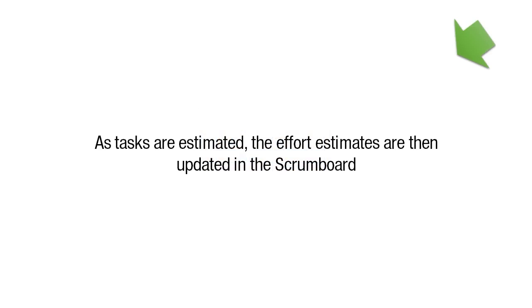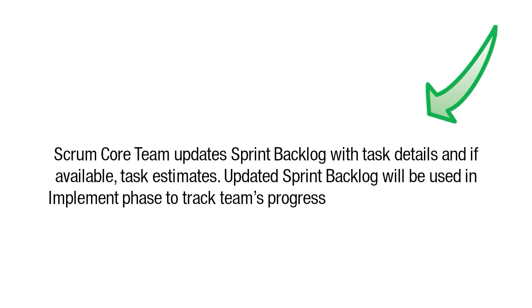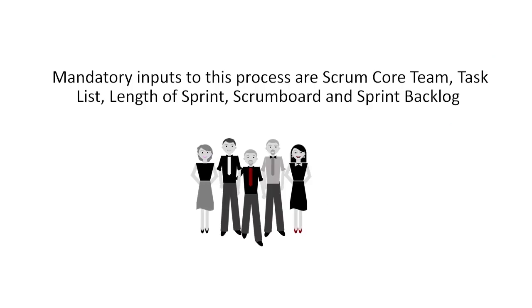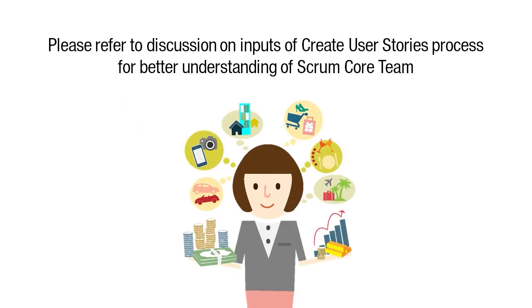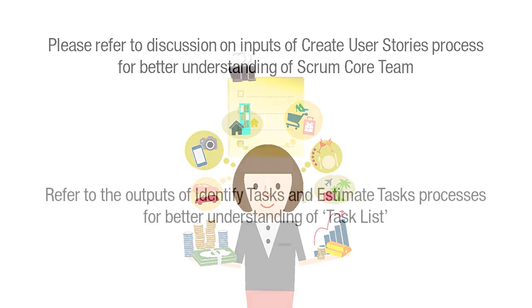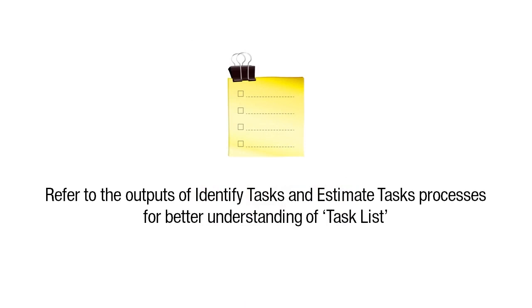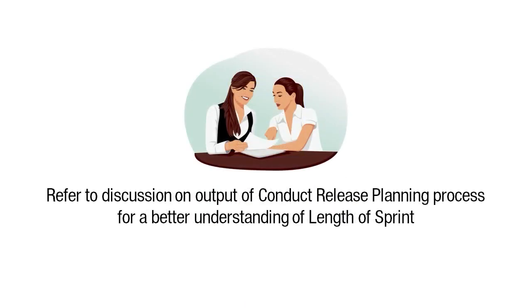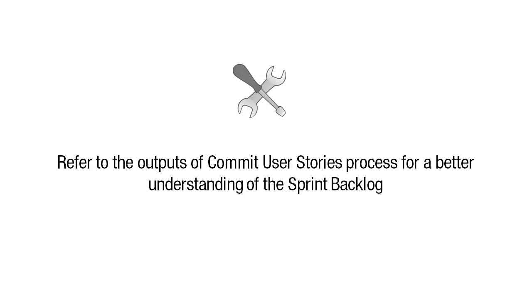Let us conclude by discussing the Update Sprint Backlog process. In this process, the Scrum Core Team updates the sprint backlog with task details and, if available, task estimates. The updated sprint backlog will be used in the Implement Phase to track the team's progress during the sprint. The mandatory inputs are: Scrum Core Team, Task List, Length of Sprint, Scrum Board, and Sprint Backlog. The mandatory tool is Sprint Planning Meeting, during which user stories are committed and tasks are identified and estimated.